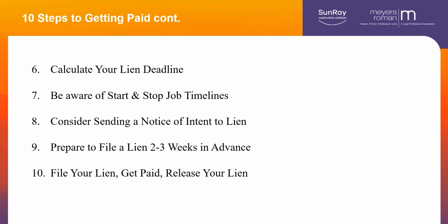Consider sending a notice of intent to lien if you're not being paid. Notices of intent to lien are not required in Ohio, but they're a very good tool to get people interested. And the people you want to have interested, it can be any of the parties, but if you send this notice, all of a sudden somebody, say the project owner, starts to say, wait, there's somebody who is going to file a lien. It's going to stop my lending, and if my financing goes down, everything else is going to be a problem. So we need to pay attention to these people.